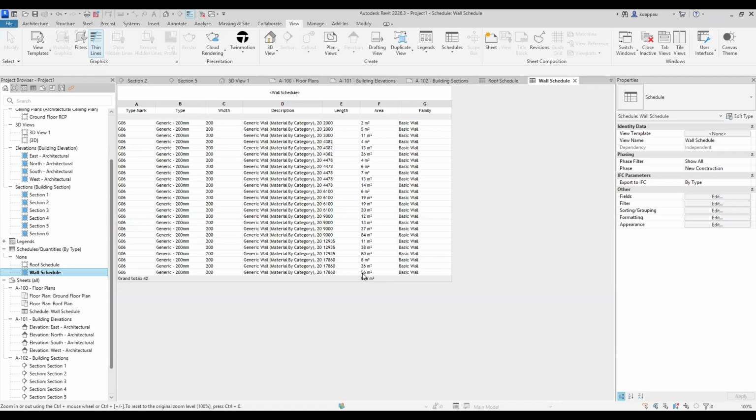I can easily pick my calculator and multiply 526 by 11, equal to 5,786 blocks.